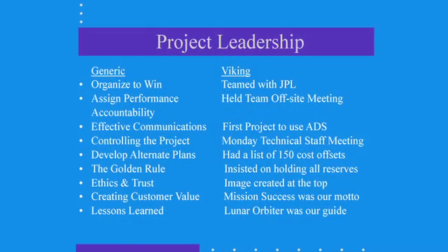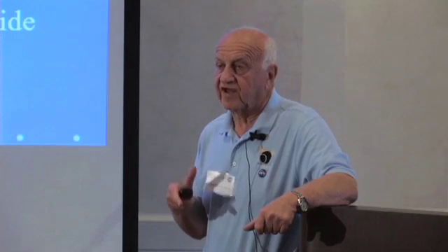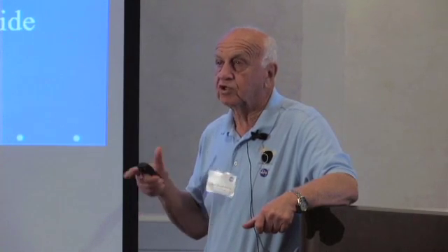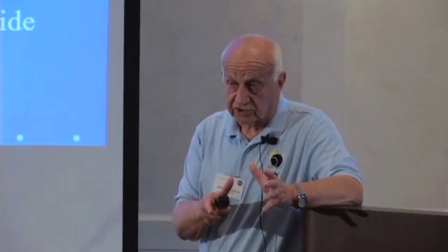Also, this is the hardest one. You've heard this. It's a trite expression, the golden rule. Insist on holding all the reserves. Jim was successful in negotiating with the headquarters at that time the fact that he would control the allowance for program adjustment instead of just the normal reserves.